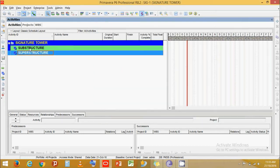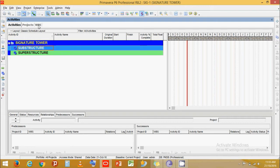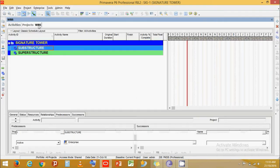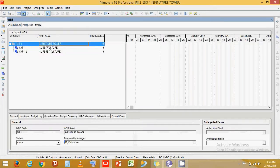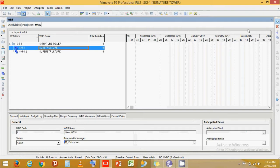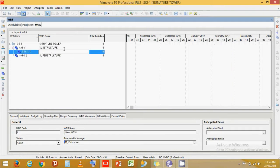Now let's break it down into further WBS levels. Click on WBS, click over the Sub Structure level, and press Add. Let's call this level B2 to B1 Level.